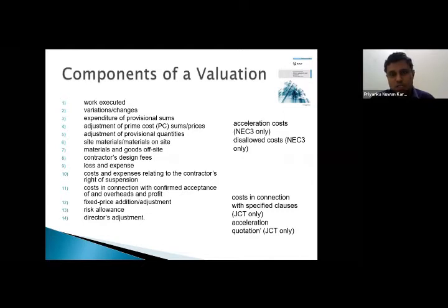It not only gives the contractor an indication of how much progress he has to achieve, but also gives him a motivation to progress. Otherwise, if the minimum amount of monthly interim certificate requirement has not been satisfied, you will not be paid. So that mode of motivation is there.